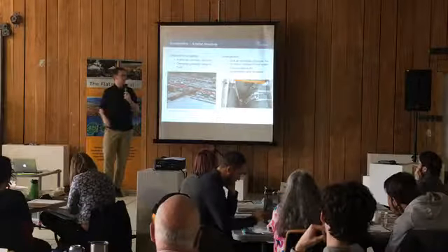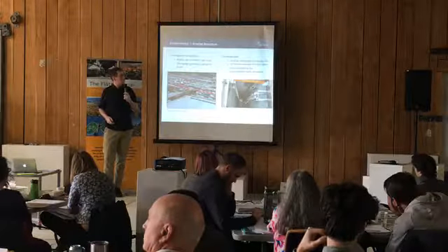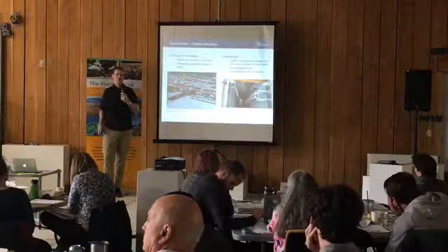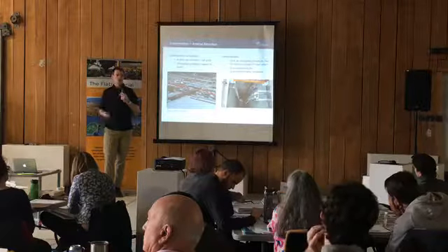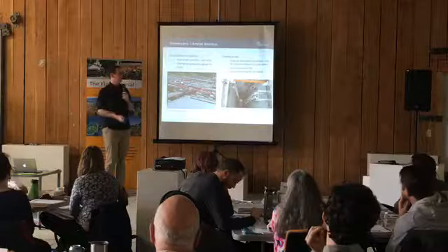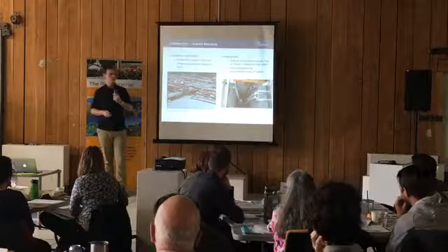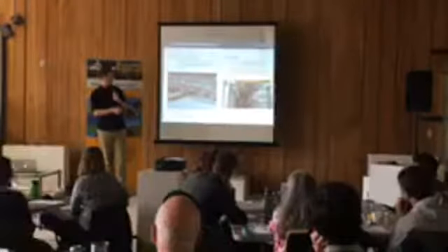Some of the other considerations for the Prior underpass in particular include groundwater and rainwater drainage. One of the components that applies both to capital costs and ongoing maintenance costs is the need for a pumping station, similar to the one shown on the left there, to drain the underpass and ensure it's not flooded.